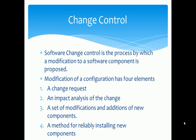The last and fourth one is Change Control. Software Change Control is the process by which a modification to a software component is proposed. Modification of a configuration has four elements: a change request, an impact analysis of the change, a set of modifications and addition of new components, and a method for reliably installing new components.